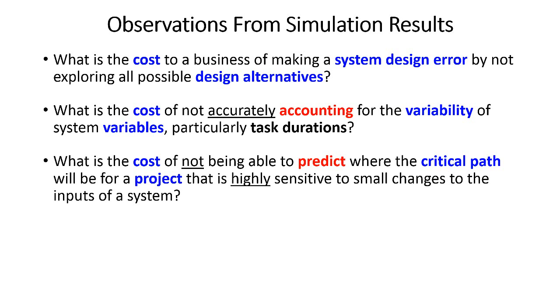So if you don't know how your critical path is going to shift and vary in your system, it's kind of hard to focus on all your paths through your project network. You'd really like to narrow it down to where your problem areas are and devote and apply your resources to the hot spots rather than to have to cover the entire network.